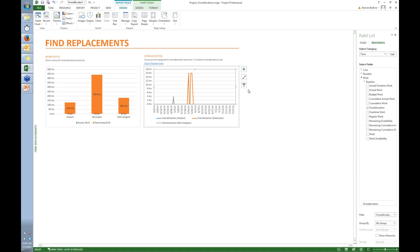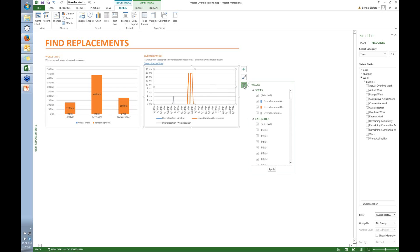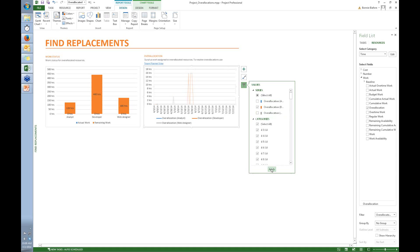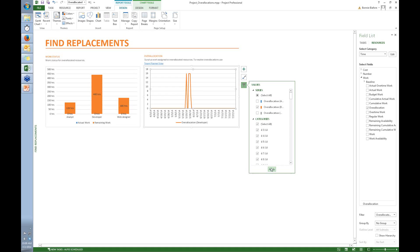So the easy way to filter this chart to show just one resource is to click this filter button. In this case, I'm going to start by looking at the developer. So I just turn off the check boxes for the other resources, and then click Apply. And now the chart just shows the over allocation for the developer. So I'm going to focus on finding a replacement for the developer.